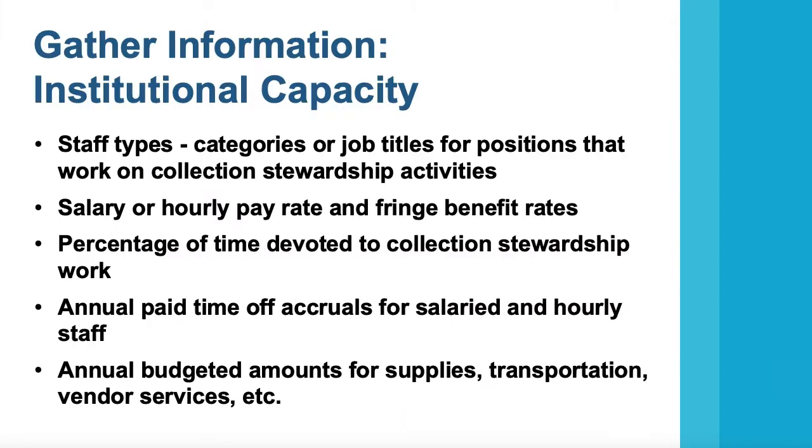Before you can enter data into the OIE, you're going to want to take some time to gather the information that you'll need. The OIE takes information you input and uses it to make a cost and capacity estimate. You will need to gather information about your organizational staffing and budgets and about the collection you wish to assess. If you don't have exact figures for all of these things, you can estimate. The more specific the data you're able to use, the more accurate your estimates will be.